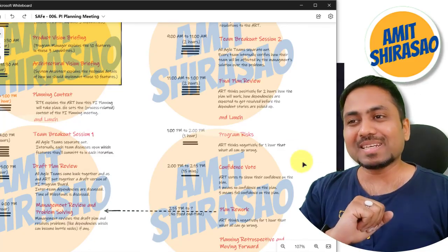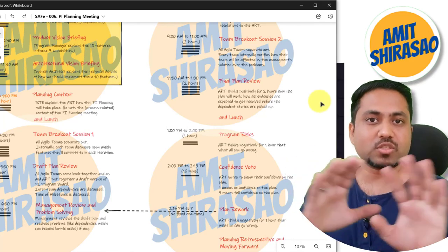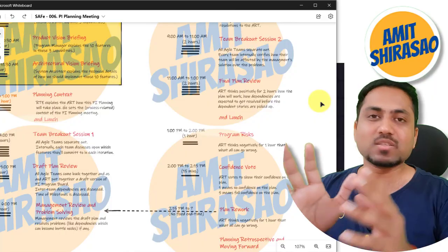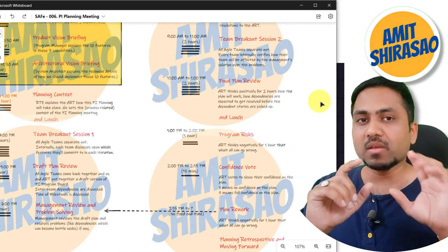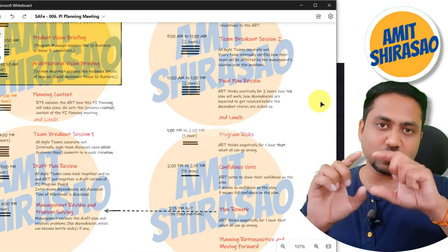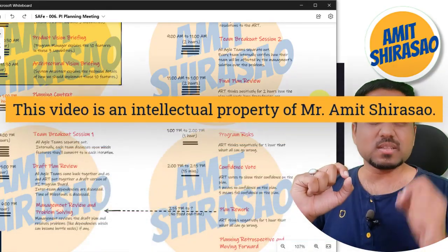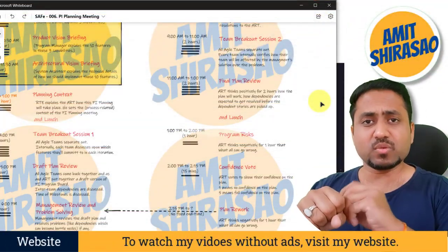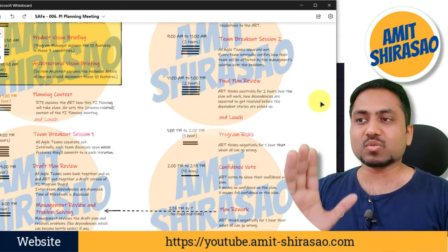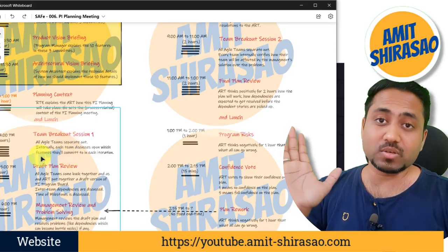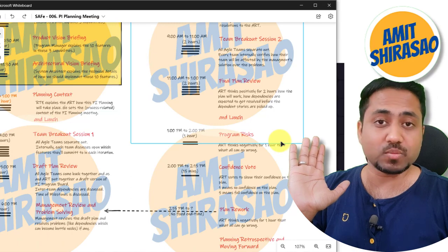Another feedback could be that we keep discussing a lot on how we will do it. Stop doing that. What has to be done, that is more than enough, because there is already a huge discussion. Don't try to involve how we will do it. This how is only to be answered up to architectural runway level. Don't discuss every little thing. This story requires this, then I'll do this, then I'll do that. Don't do that. It takes a lot of time. So your team breakout session, 3 hours were also insufficient for you, team XYZ. Stop getting into too many details.